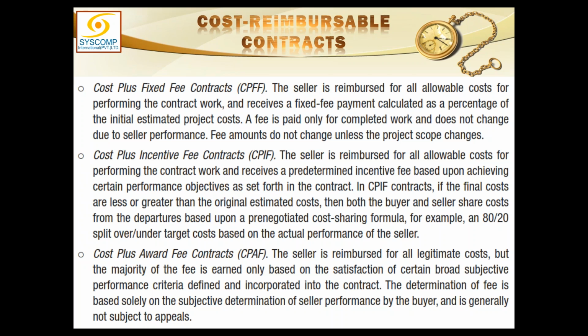But this depends upon us how much we want to reward him. We do not predefine that this is your incentive. Because if we pre-decide, then that is cost plus incentive fee contract. But in this case, it is cost plus award fee contract. So contractor can expect to be rewarded at the end of the project. So that is the award fee.